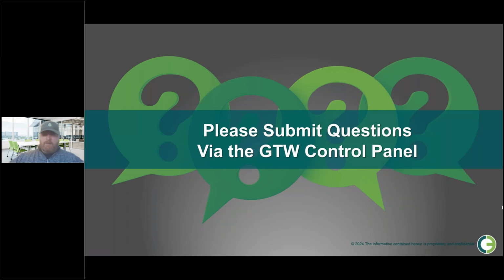And then from that, don't try to run before you can walk. A lot of our clients, for example, don't start with their first project trying to solve all the problems of the world. They will specify, for example, on the first project, we're just going to do workplace planning. We're just going to do IWPs. Maybe we'll just do pipe and steel.